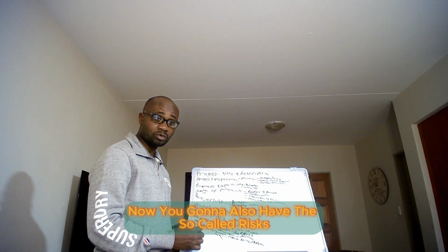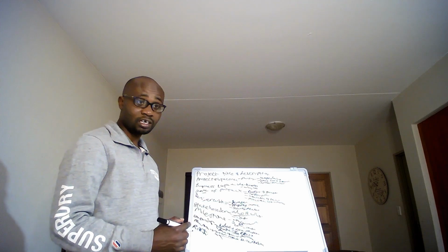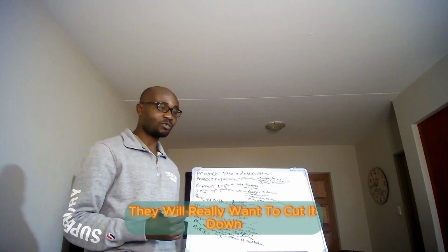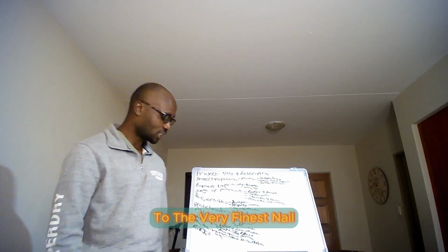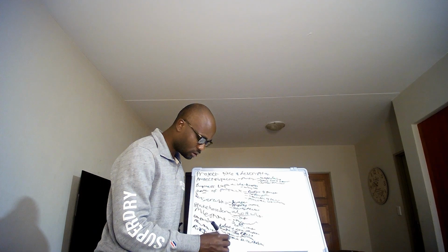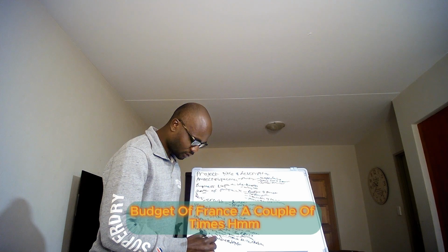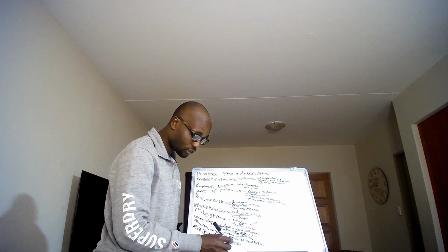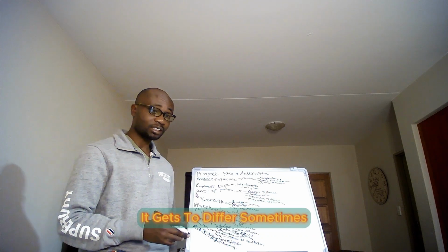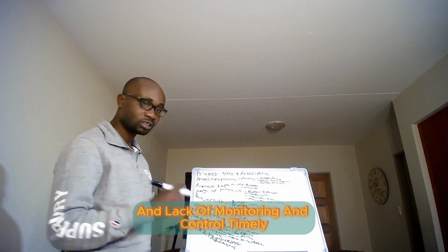Now you're going to also have the so-called risks. Risks is a very broad subject, but here you give it in the overview. Because I know that when you talk about risk, especially when you get the pessimistic people, they will really want to cut it down to the very finest nail about all that can go wrong in the project. In overview, we're going to talk about the weather conditions that can be risky and actually lead to a delay in our project. Budget overruns. A lot of times, the money that is being budgeted for and the money that actually gets spent differ sometimes. And a lot of times, it's not because it can't be avoided. At times, it's because of negligence and lack of timely monitoring and control.